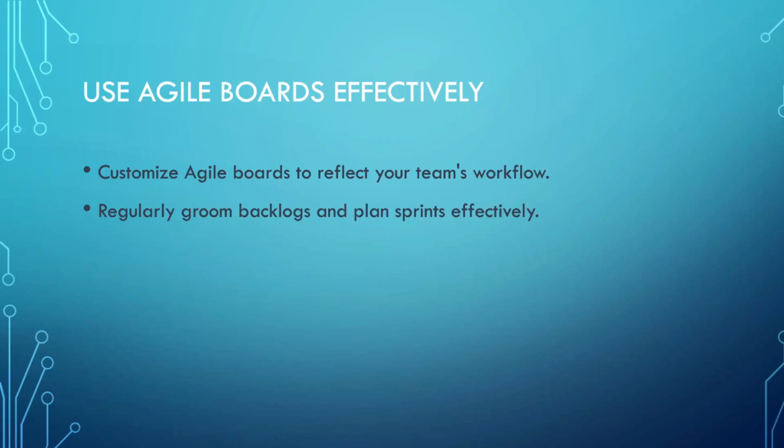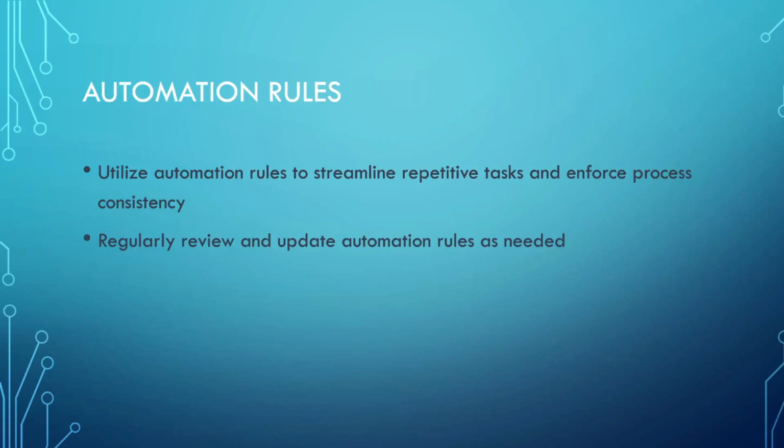You want to avoid that because on the sprint planning you want to define and say, look, we are gonna do this, this, and this, which actually those tasks are part of the sprint backlog, and when that sprint is finished, you can see which issues were finished, which were not, which are actually gonna go to the next sprint, and etc. Automation rules.